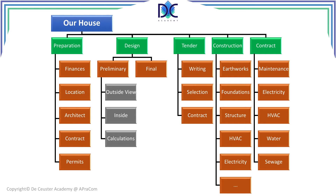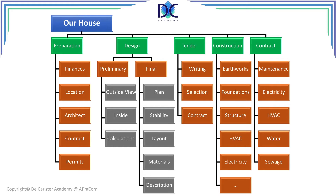Looking at the preliminary design, we consider the outside view — very important for permits — how it will look inside, some cost calculations, and preliminary stability calculations. Once approved, the final design includes the plans, stability, layout, materials, and descriptions. All these things can be part of building a house project. When you want to build your own house, this is a good way to think about how you will tackle the project.